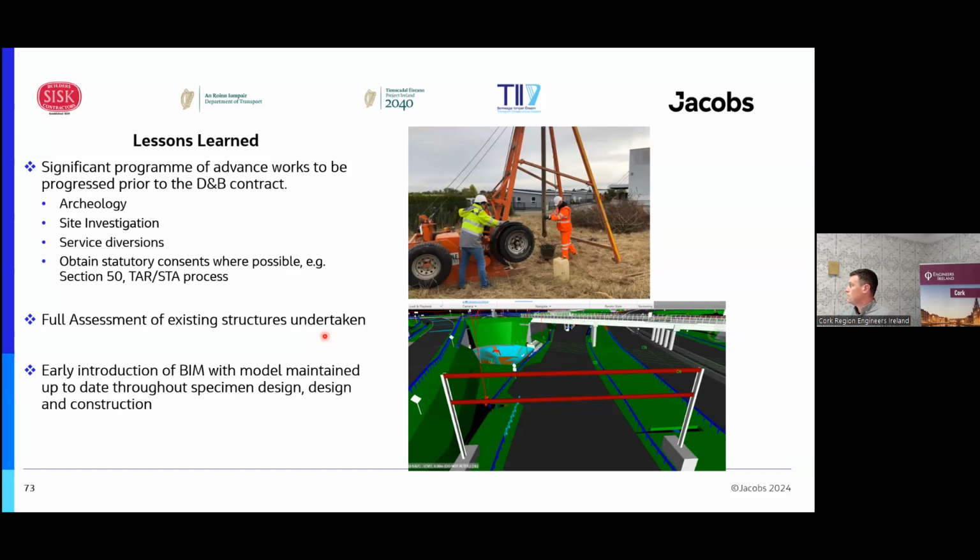That makes sure there are no clashes in sight lines with advance direction signage, VMSs, and structures. As well, just to check your BRS and your overlaps in constrained sites, it really does help flush out issues early. And going back to the communication piece, it's a very useful tool to demonstrate new routes and new infrastructure that's going to become available. It helps communicate to the non-construction public very clearly, with high-end graphics, what's to be expected in the coming weeks and months.